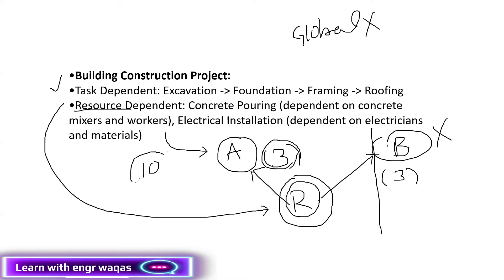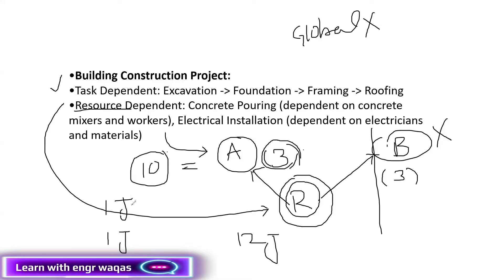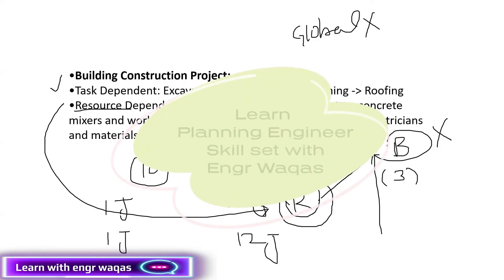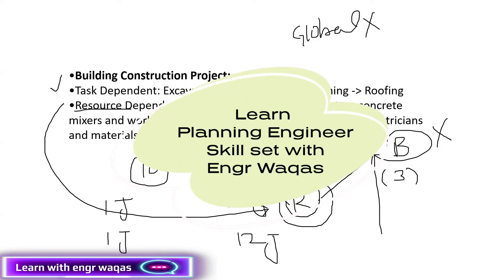Let's say if I have defined that this activity is going to be completed in 10 days, and my one week is three days because this resource is available for only three days. So one week equals three days. It doesn't matter that my project activity goes from 1st January to 12th January — because Saturday is off, for example. Now if this is a resource dependent activity and the resource is available only three days a week, Primavera P6 will distribute it: first week three days, second week three days, third week three days — ending around 22nd January because three weeks are involved for 10 days.